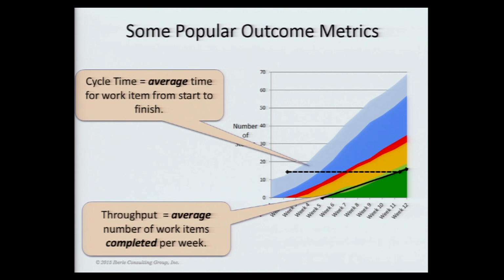We did the throughput and cycle time. And this was a challenge to get for many groups. They were measuring velocity inside one team. So they could tell you what the velocity was in their development team. They couldn't tell you what the average velocity was or throughput to take to get jobs from being requested to being delivered.